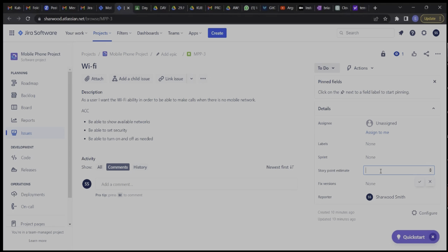You ask why they have their different numbers. Okay, perfect. So if I'm asking, okay, who said the 3? Why did you pick a 3? And then they give their explanation, right? And then the person of the 5, why did you pick a 5? And they give their explanation. And then we come to a compromise.